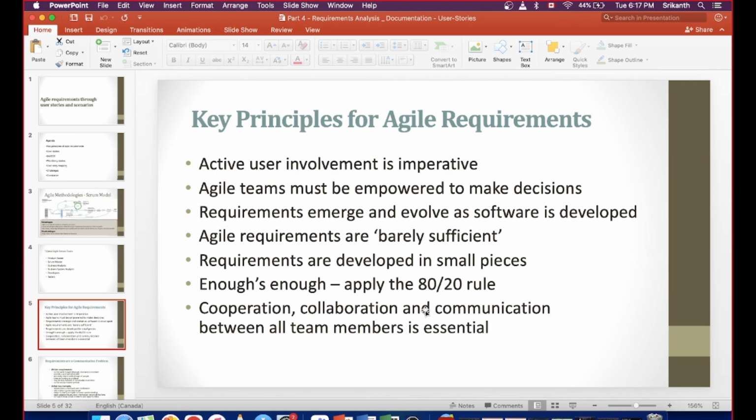If there are any requirements or user stories pending and not completed, then the BA will not be handing it over. This is called definition of ready in agile terminologies. When the BA completes his user story requirements and gets the sign off from the business, those cards are ready. Those cards are called DOR. DOR means definition of ready.